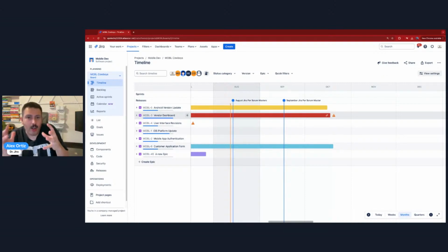They collect our stories. They're not just a really big story, but they should be a piece of work that is usually at least a whole sprint's worth of work, or maybe a couple sprints' worth of work. And they also encapsulate the stories that many different team members in a particular sprint may have to contribute to. So epics are really good from that behalf.